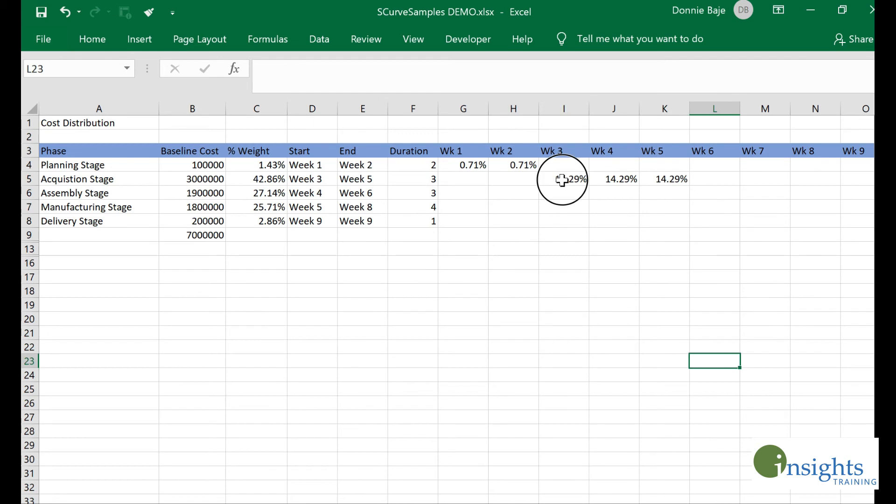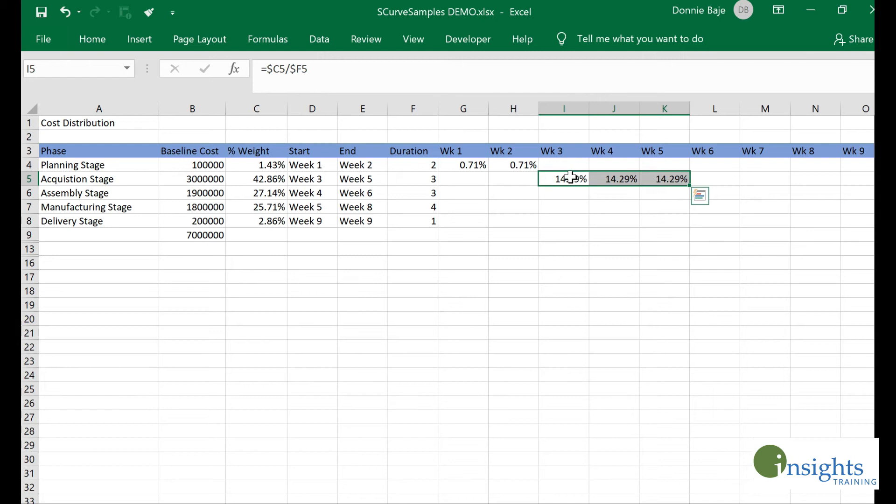That means evenly, 14.29 percent of the budget will be used by week three, week four, and week five for the acquisition stage.